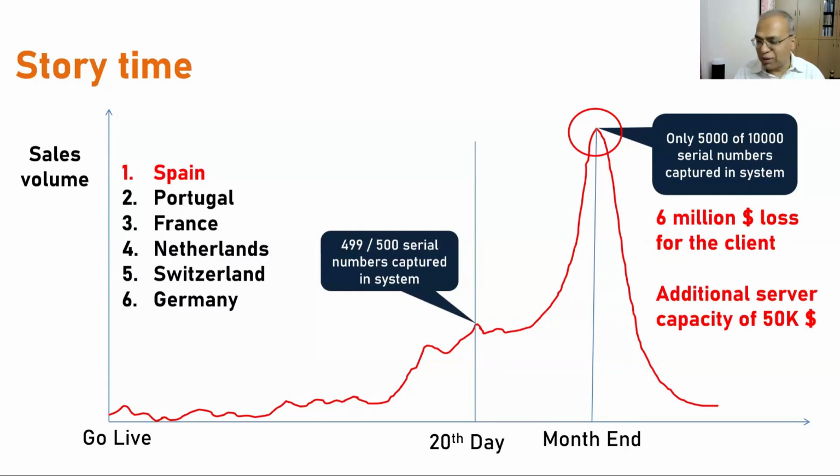So that issue kind of got resolved at the local location where we are working. But by this time, we have done enough damage to the project. This news spread to other locations as well, like the countries which were supposed to go live with this system: Portugal, France, Netherlands, Germany. All these countries were supposed to go live one after another. And we were the first. In a sense, you can treat us as a guinea pig. Other countries would go live after us, maybe three months later, kind of an iterative deployment. But they heard this news, and then they all flatly refused, saying, we are not going to go live with this system because we can't trust. This happened in Spain. It's likely to happen in our countries because we are bigger, like France, Germany, Switzerland. They're bigger in terms of business compared to Spain.